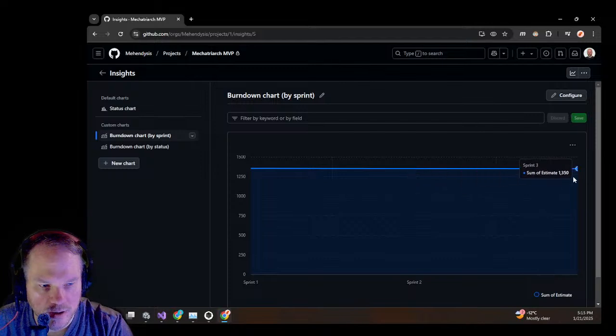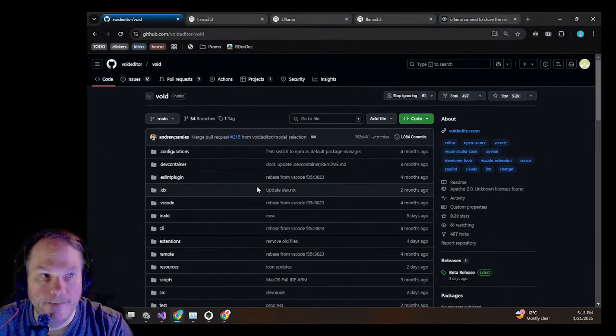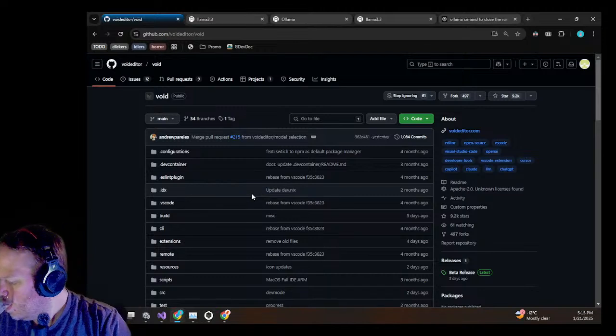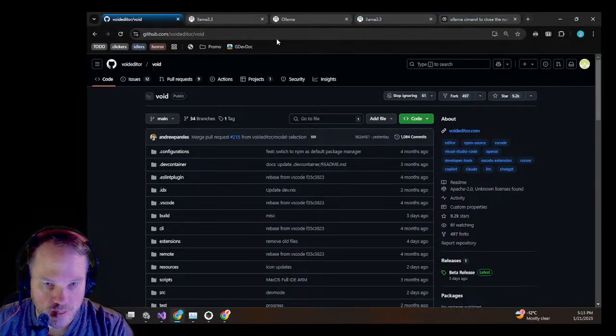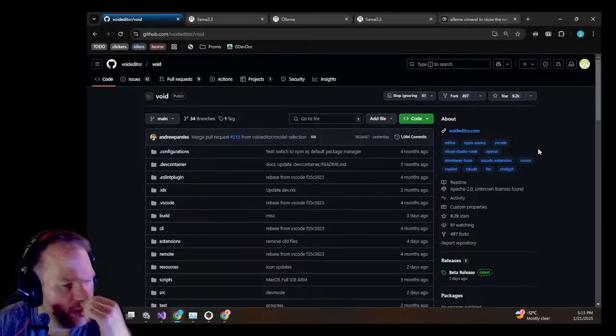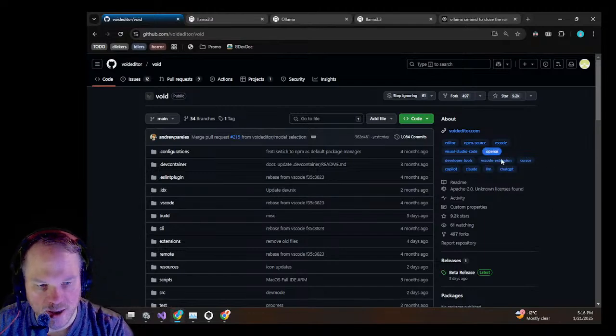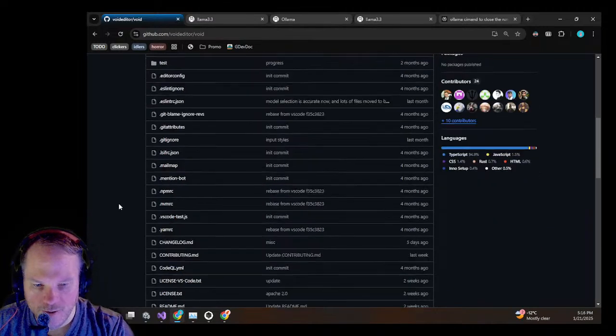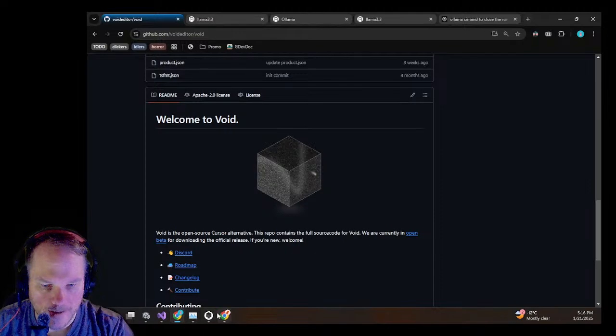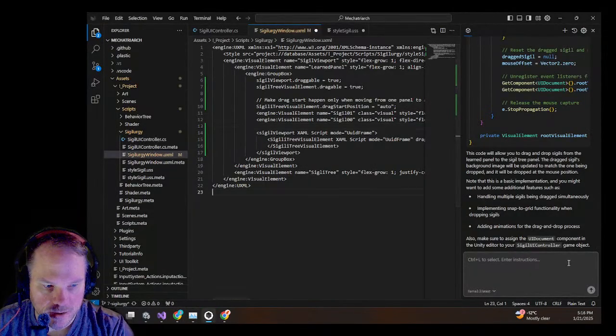So the burn down chart is done. Let's go back. If you had a team, you would do your burn down chart at the end of the week with them and ask how much estimate do you think you worked on your task, and then at the end you remove the number once the sprint is done, once the sprint estimate has been calculated. So it's done.